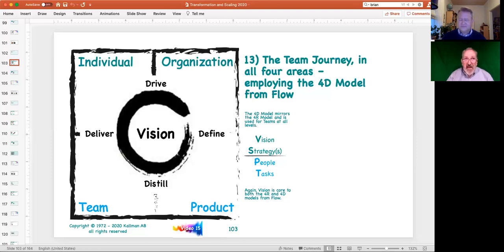So that's another unifying concept that flow provides: agile doesn't mean you take off without a vision. You don't build a skyscraper with agile. You have to have a clear path to what you want to deliver before you begin iterating. You don't have to have the details nailed down, but yeah, you have to have architectural drawings.